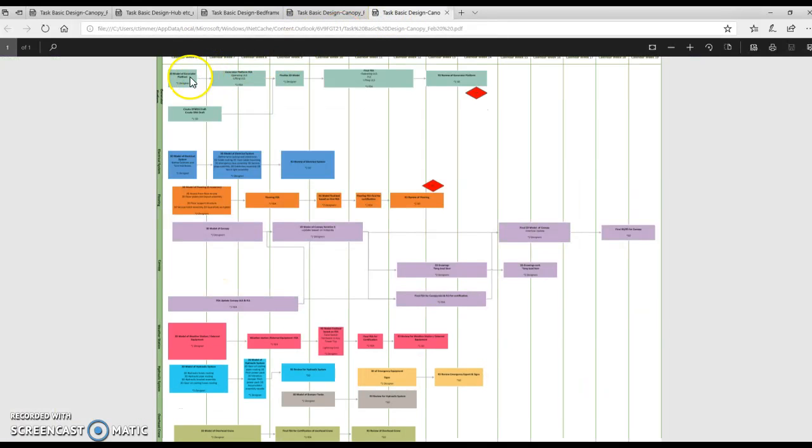I know you're looking at the canopy design and you're questioning what we do within a certain stream when there are two tasks in parallel within the same stream. My recommendation is to combine these two tasks and do a single task that feeds the next task. So within that stream, we just have one sequential stream of tasks. It's quite simple. Combine these two tasks, flow into this task, combine these two tasks, and so on. Down here, it's quite simple.